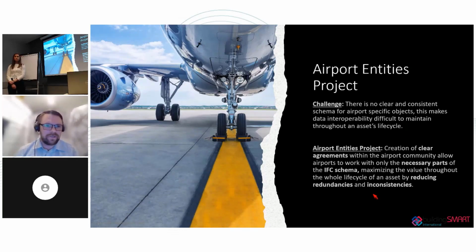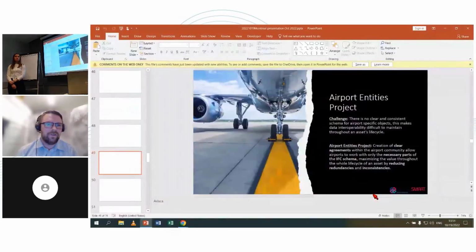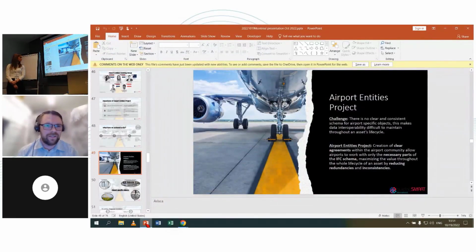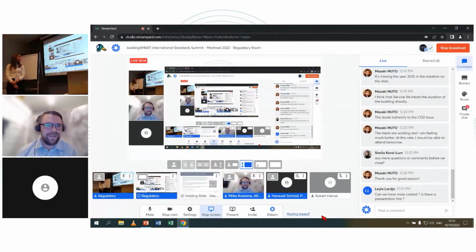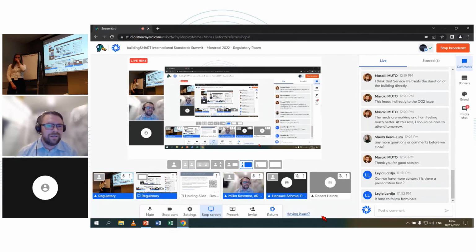And adding to that, the regulatory side, at least in Finland, has the national level, but it also has the city level of regulations. So there are various stages and many rules that are actually applying to that. In the same case, it might have limits on where you can build on the plot of land. So there might be a distance limit or something like that, which is not necessarily part of the asset information requirements, but it's a requirement of being further out from some other border.